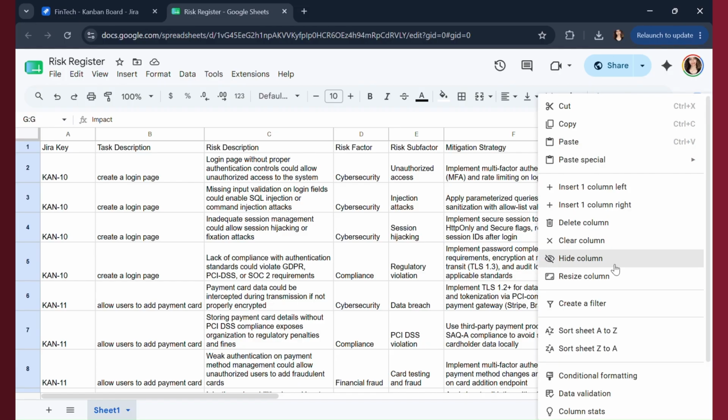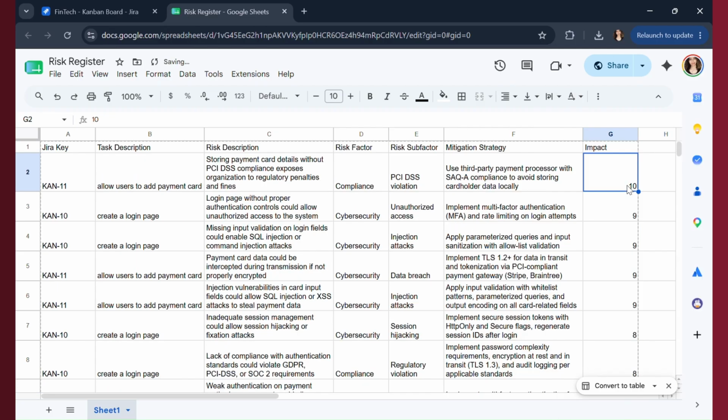Now, we can also sort by impact, right? So this is something we can do. Sort the sheet from the highest impact to the lowest impact, because there could be, let's say, 50 projects with the changes being tracked across all 50 projects for each task. So of course I don't have time, or the risk expert does not have time, to check every change that's done across all the projects in the portfolio. So this helps us prioritize the most important risks, for example, the top 10, and check if these should be acted upon indeed, and what mitigation we should do for these risks.